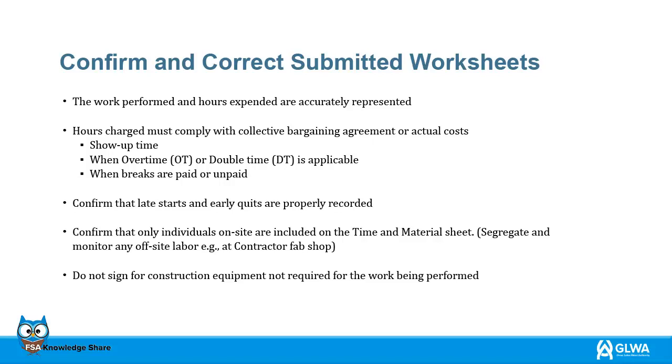What time did they show up, and if overtime and double time is needed, and paid or unpaid breaks, late starts and early quits are properly documented. Make sure that only individuals that are on site are included on the time and materials sheet. Segregate and monitor any off-site labor, for example, at contractor fab shop. Do not sign for any construction equipment that is not needed for the work that is being performed at the site.